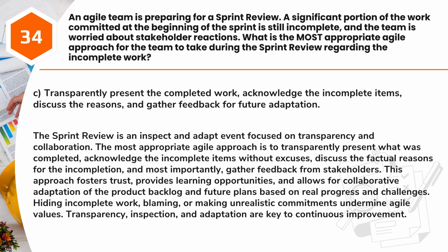Answer: C. Transparently present the completed work, acknowledge the incomplete items, discuss the reasons, and gather feedback for future adaptation. The sprint review is an inspect and adapt event focused on transparency and collaboration. The most appropriate Agile approach is to transparently present what was completed, acknowledge the incomplete items without excuses, discuss the factual reasons for the incompletion, and most importantly, gather feedback from stakeholders.